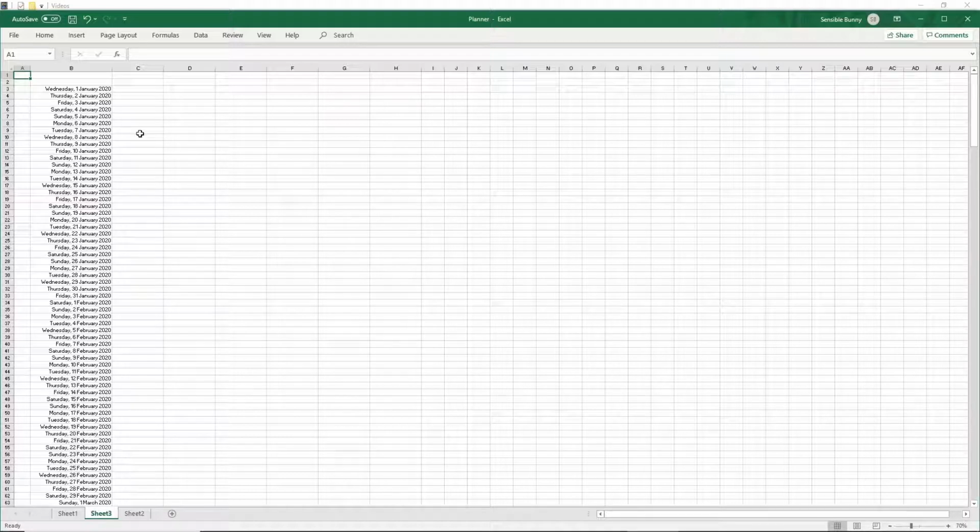Now the next stage is I'm going to delineate each of the working weeks. Now, probably unless you're scheduling things on a weekend, you don't need the weekends to be included in the scheduler. And that will mean that the whole spreadsheet will be a lot shorter, easier to navigate through. But before we actually take those out, I'm going to add borders to delineate the weeks, which means when we take the weekends out, that we'll have nicely delineated bordered weeks all the way down.